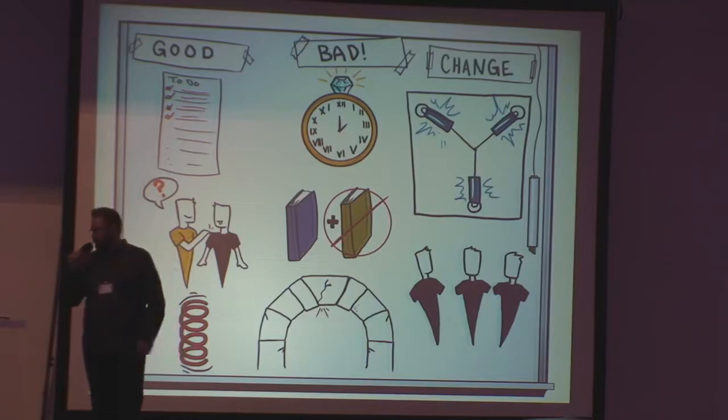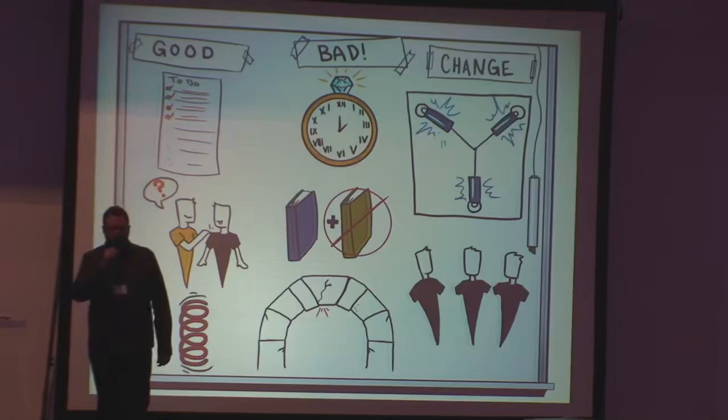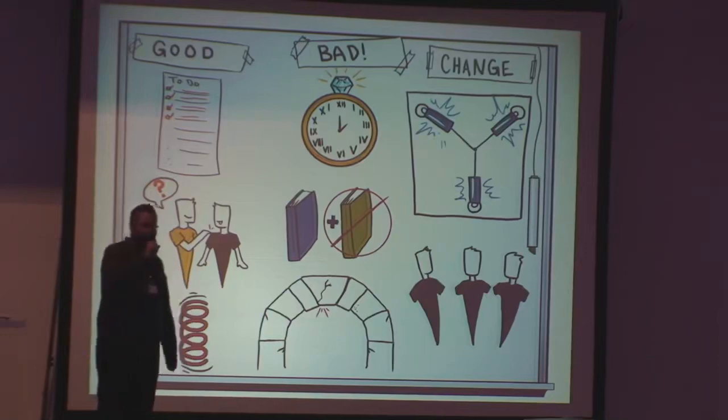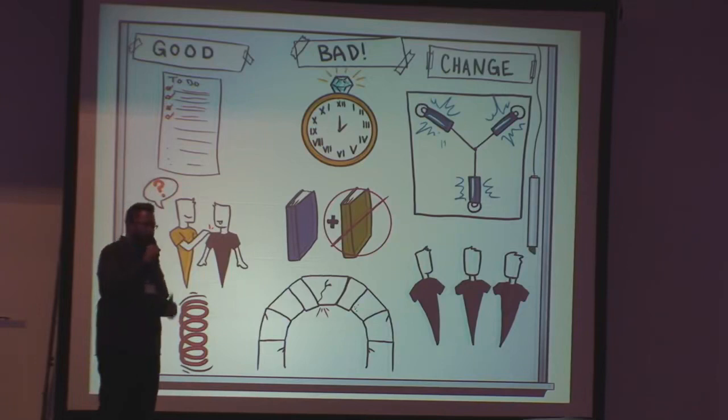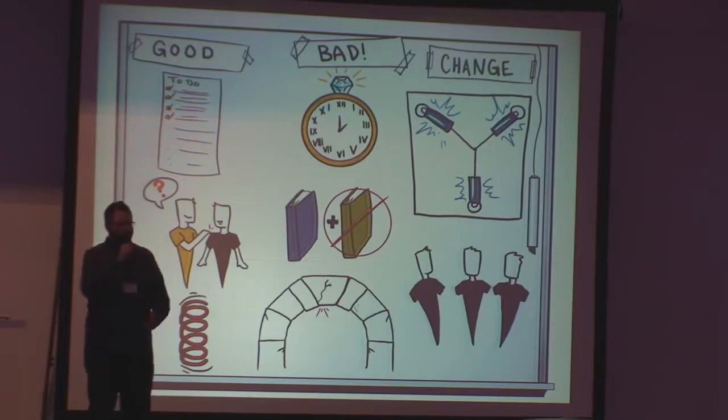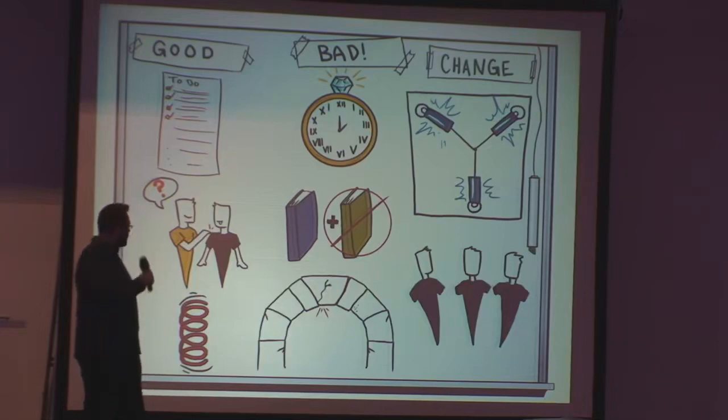Also bad, during the Scrum training, I recognized that we were violating Scrum in a different way, which is that by reviewing these stories and defining security criteria after the planning meeting, that meant we were changing the story after it had already been pointed, so it had already been scoped for how much work needs to be done. And then we were coming in after they said, okay, we're gonna do this much work, and saying, oh, and there's also this other work that you need to do as well. So we were adding more work.